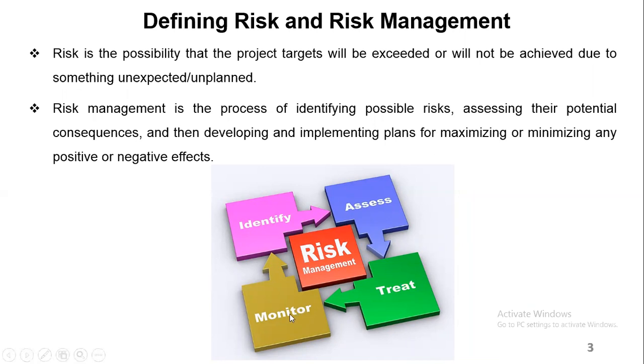While you are implementing it, you need to monitor and control. And while you are monitoring, controlling and implementing those changes, sometimes you might introduce new risks in that process. So you need to identify those risks again, assess them again, treat them, and monitor. So it becomes cyclic, you see.